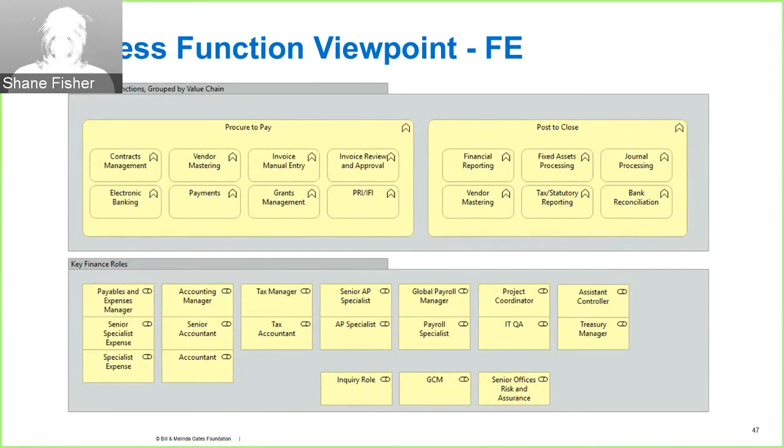And so I built this as a way, at least in my head, to think about what this relates to. So if I'm looking at a specific requirement, what does it tie back to? It gave us a way to think about the bucketing of the requirements. What's the work stream? Who needs to be involved? Who needs to show up at those meetings? All those kinds of things, right? So that's one way that a business function viewpoint can be useful.